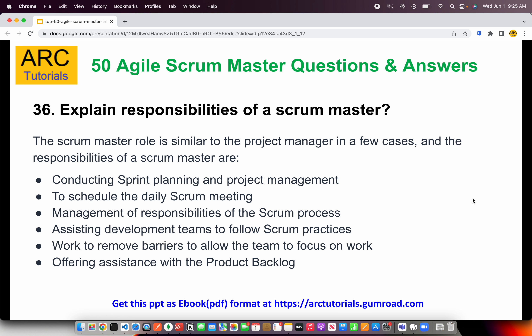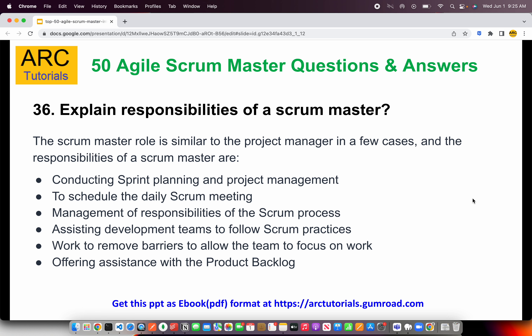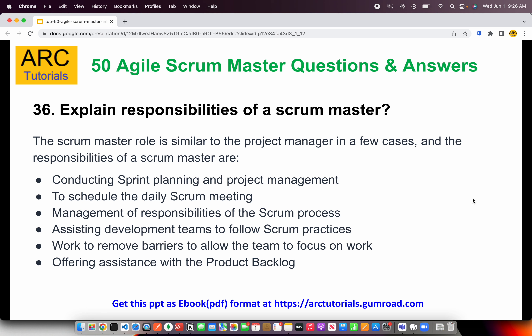Explain the responsibilities of a scrum master. The scrum master role is very similar to a project manager — there is a thin line between scrum master and project management. Conducting sprint planning and all ceremonies is part of the scrum master's role. Scheduling and running daily scrum meetings is part of the scrum master's day-to-day job. Managing the scrum process is also part of their responsibility. Removing blockers, impediments, or barriers for the team is also the scrum master's role — though that does not mean the scrum master will solve your problems directly. The scrum master's job is to facilitate meetings with the required stakeholders to resolve impediments or blockers.